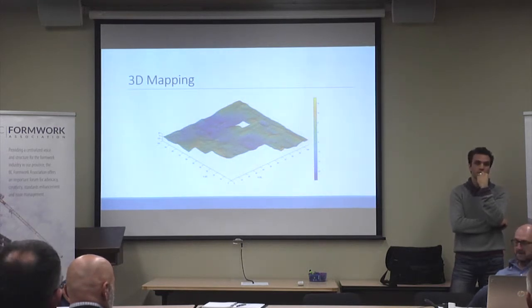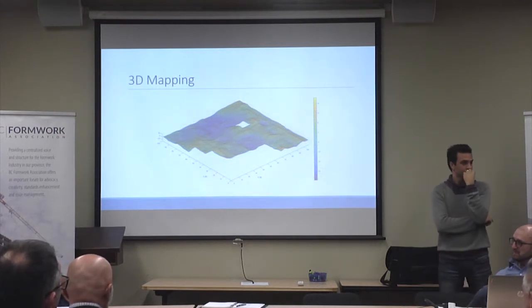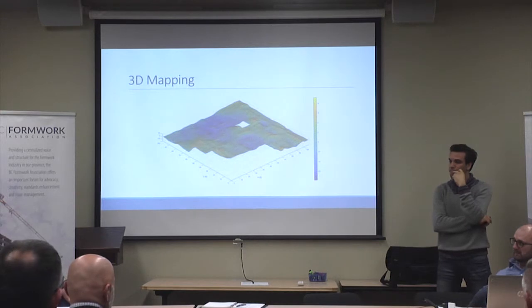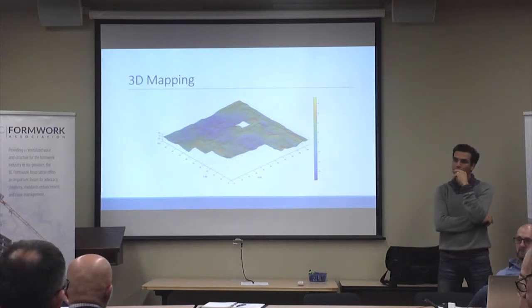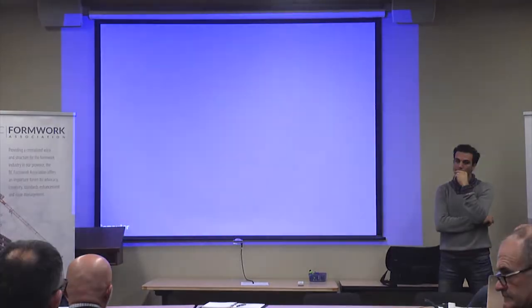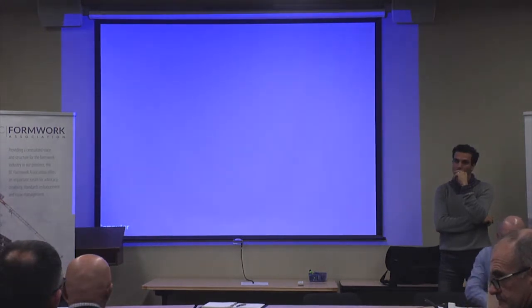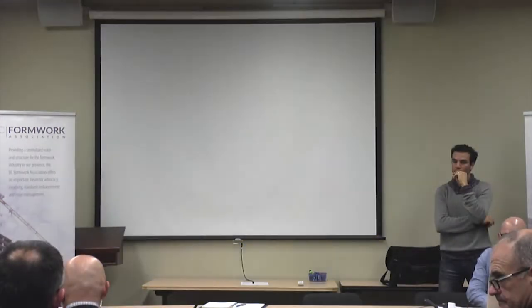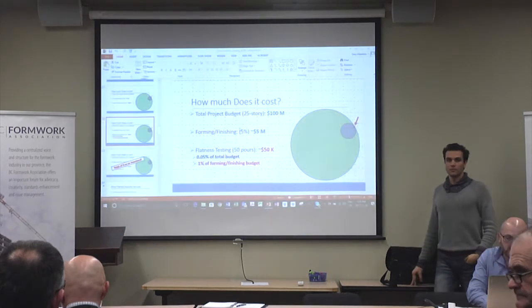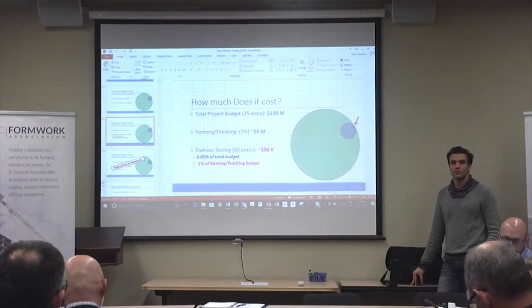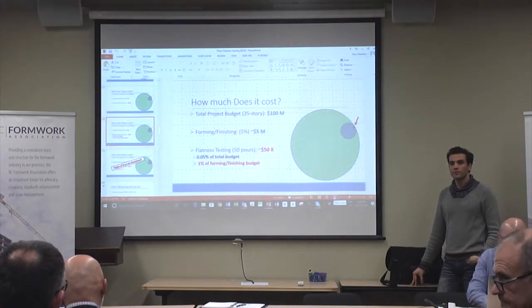The more we throw their division or their association on our tender document, the stronger it gets. Exactly. Is there an issue with laminating toppings? Because often we are called to a certain level, a quarter inch in 10 feet. Flooring guys are called to an eighth inch in 10 feet.